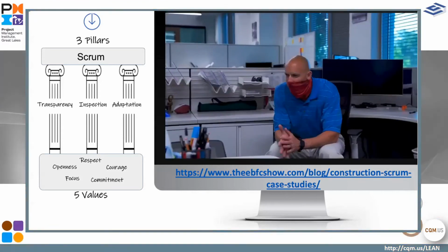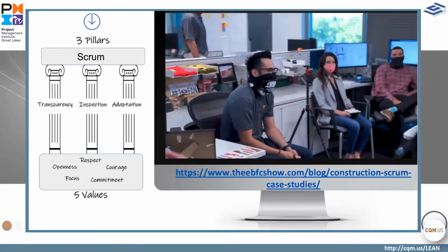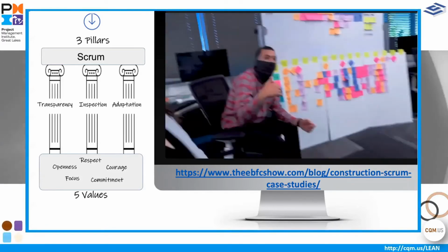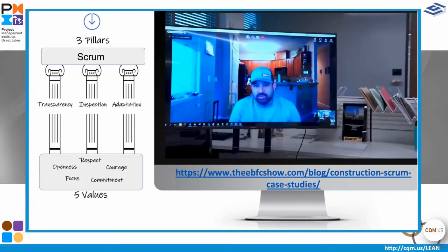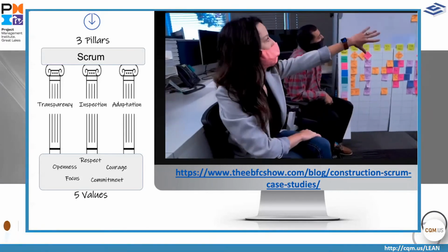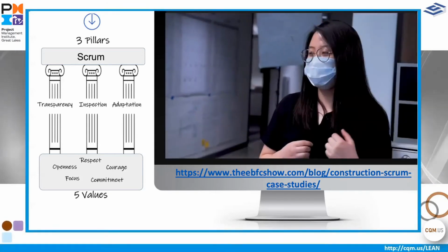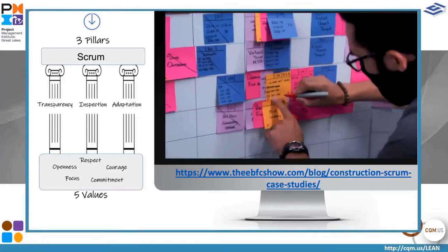This allows our team to coordinate and align our efforts. Finally, on Friday, we have our retrospective meeting where we talk about how the week went and identify and select opportunities for improvement. We do this by creating a plus delta list where everyone can bring in new ideas or we can discuss hurdles we faced and we'll get into the root cause of problems. Once we identify ways to improve, we actively make sure those items are being addressed for next week's sprint.